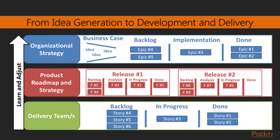The Analyze stage of the workflow is where a feature is detailed and decomposed into a set of user stories that can be delivered by the agile development team. In the context of Technis, the product and roadmap strategy level is where the product itself is defined and its release roadmap articulated. One feature could group all user stories focused on reporting for the service manager; another feature could group user stories for reporting to external stakeholders; a third feature could focus on user stories for prediction of volumes. One release might be focused on all reporting features while a second release focuses on prediction features. We then move to the delivery team level, which can engage one or more teams, implemented via a sprint or Kanban approach to deliver the product increments included in the various releases.